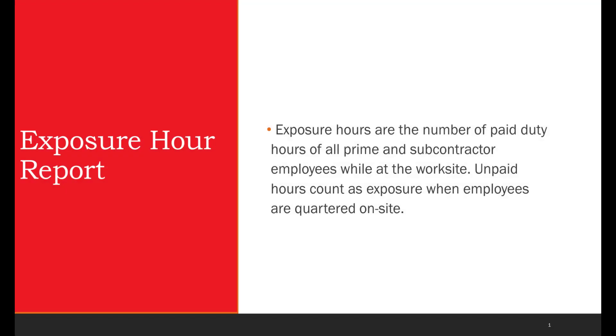Exposure hours are the number of paid duty hours of all prime and subcontractor employees while at the worksite. Unpaid hours count as exposure when employees are quartered on site.